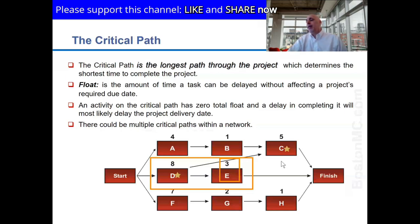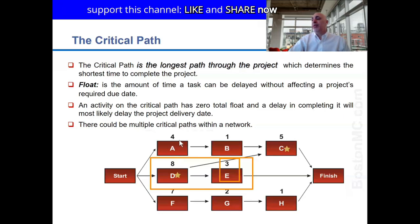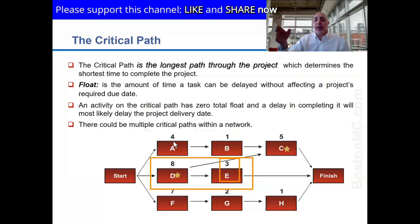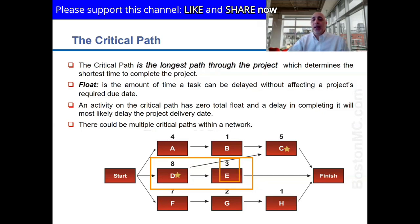There is more to this in risk management and simulation analysis, but at a surface level, these critical activities are the ones you really don't want to miss. Float tells you that if something goes wrong, up to a certain point it's not something to panic about. However, even when you have float, a delay may still cost more money if a contractor is involved. That's the concept of critical path and float.